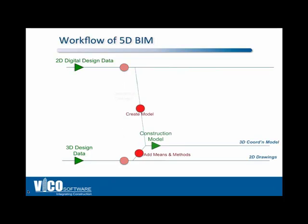After you've determined what's changed, if it's 2D data, somebody's got to create a model. If it's 3D design data, somebody's got to create what we call a construction model or a coordination model from that. That's where the means and methods of construction come in. I'm not one to fault the design team for not including those — I think it's outside their scope.